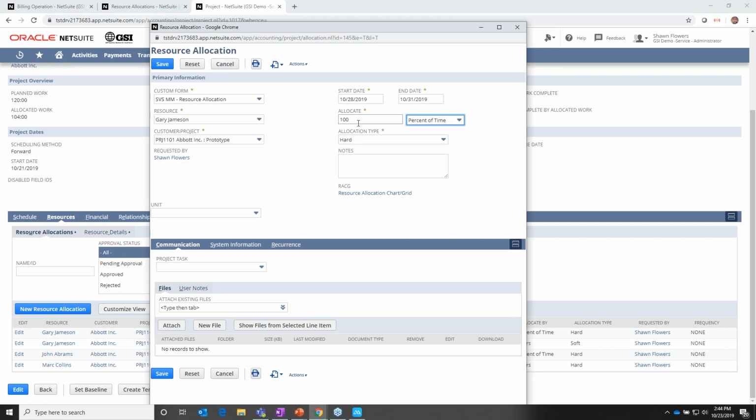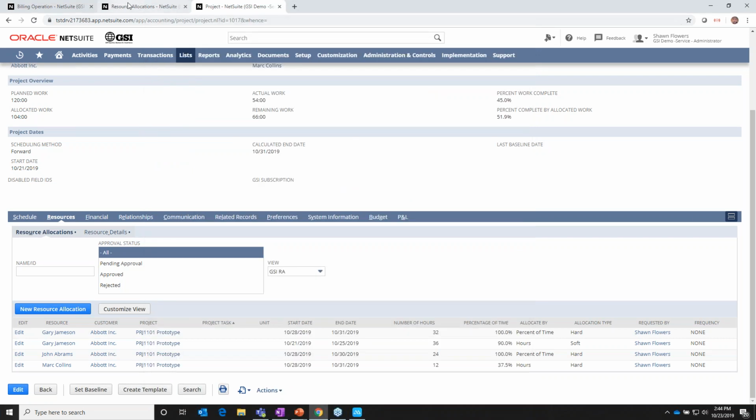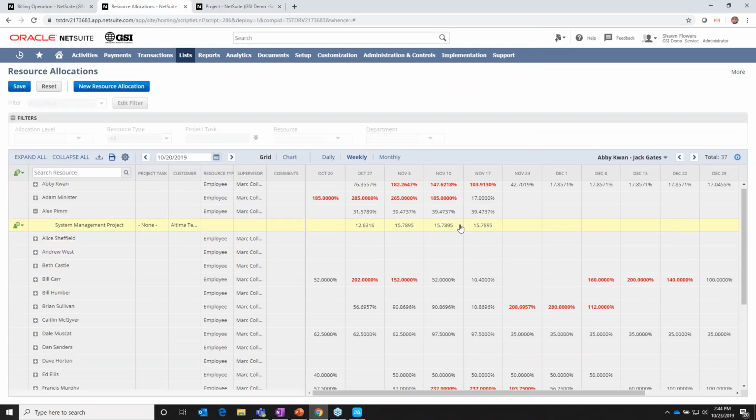So if, for instance, we had 4 hours over a date period and the first 3 days were totally consumed, it would move those forward to the second to last day kind of thing. And so all of that is building what you see in the resource view.